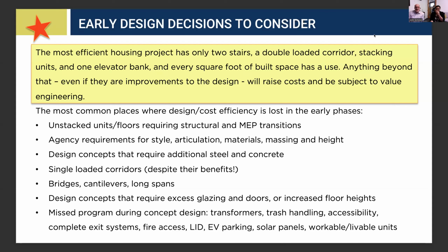Design concepts require additional steel and concrete. This is often the architect's fault. If they come in and say, I really want to do something that juts out this way and turns up this way, and there's a big hole in the middle of the building that you can see through to the mountains, all that is structural gymnastics that are really, really costly. So again, that doesn't come in your zone, it comes in ours.